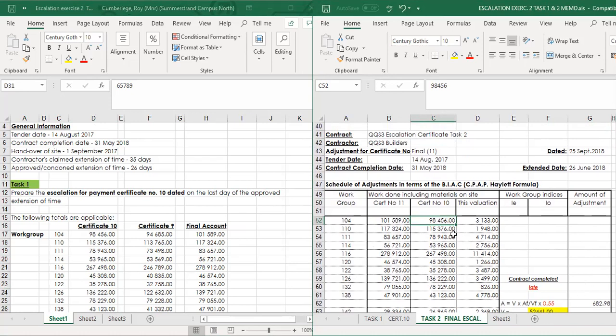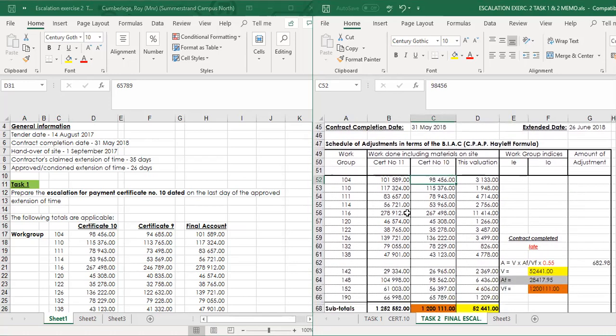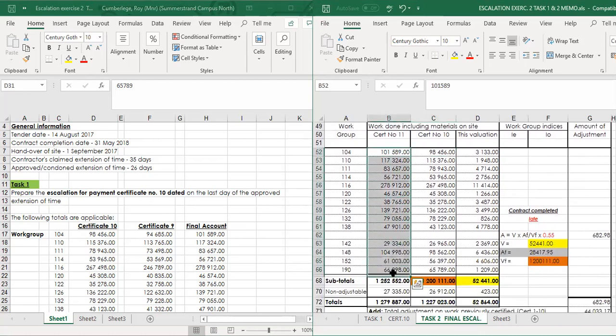You use the formula. So firstly, let's calculate what is due to the contractor that is subject to escalation. So it's the final account values, and there's a whole process that we're going to learn at a later stage on how to determine the specific values. It is a lengthy exercise based on the final account. So that figure is given, that's your final account figure, less the previous totals, which is in this case from your practical completion certificate, and that will give me the difference.